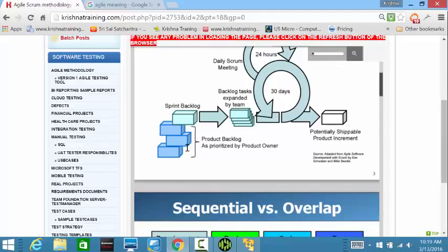after 3 sprints, I guess, the project manager and the product manager schedule a call with the client, and they will pick a few members from these 2 Scrum teams, the experienced people, from the developers and the QA. They pick a few people. Then they schedule another demo to the client, where they have completed the 3 sprints of work, and they will show that, okay, we have completed these 3 requirements from the main requirements, and this is what it is looking like. Are you in line with your expectation, or do you have any issues?